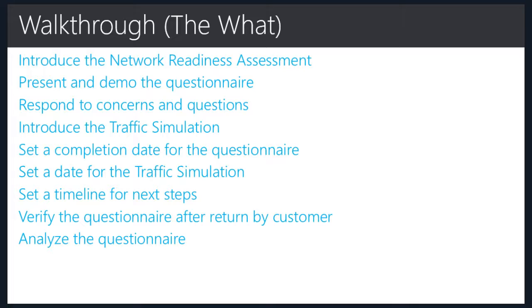We'll also introduce the traffic simulation. What are the tool requirements? What are the tool needs? Why are we doing this? And how can the tool be run? We must set a completion date for the questionnaire. If you don't set a date, it will never be completed. We'll set a date for the traffic simulation, and we'll talk about who will be responsible for running this.